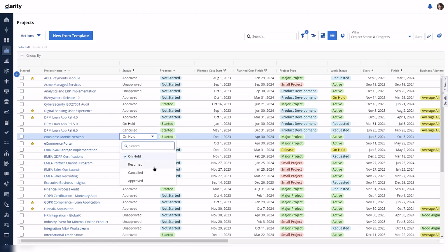Let's set the status to Resumed. With Resumed as the current value and today's date falls within the financial dates, the On Hold and Approved choices are now available. The status field lookup choices for team and custom investments behave the same as with projects. However, there is no separate access right to control the approved choice. That choice will always appear based on the current state in combination with the progress and financial dates. Managing the status lifecycle for ideas, projects, and custom investments is now easier to use within the investment grid layout.